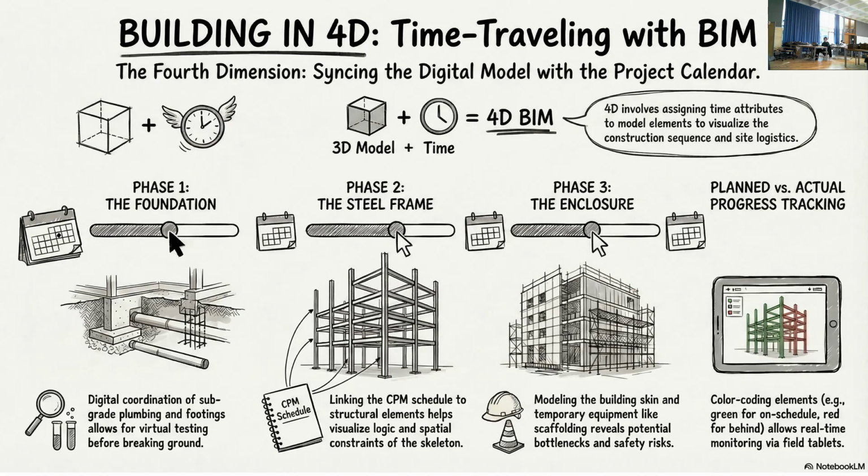This traffic engineer, many months before the construction, goes there. They count the number of cars passing through. They look at the pedestrian traffic through the day, through the weeks, through different times of the year. Then they make calculations and say, for that site, you need to bring trucks, you need to bring cranes, etc. So the traffic will be intervened, right? So you provide a traffic management model.